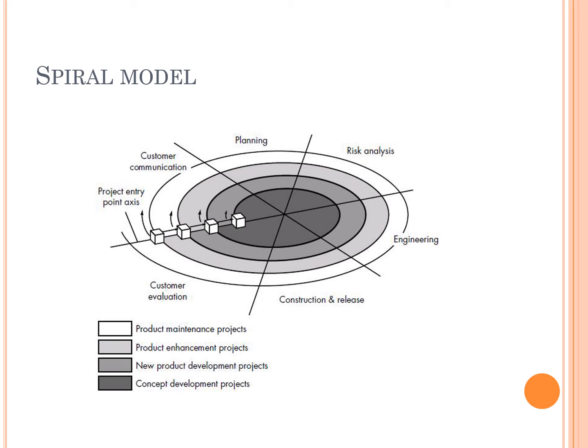The last phase in the spiral model is evaluation and risk analysis. Risk analysis includes identifying, estimating and monitoring the technical feasibility and management risks, such as schedule slippage or cost overrun. After testing the build at the end of the first iteration, the customer evaluates the software and provides feedback. These are the 4 phases and the activities which take place in them.